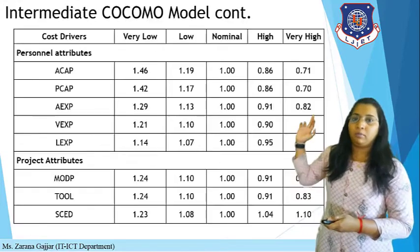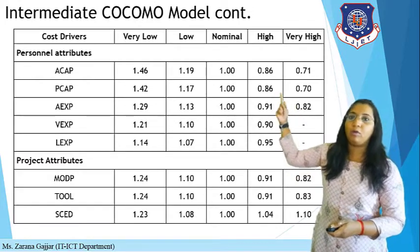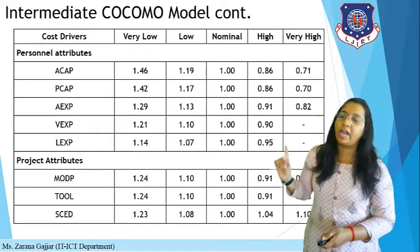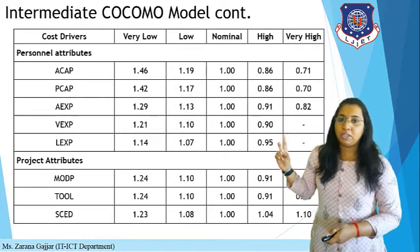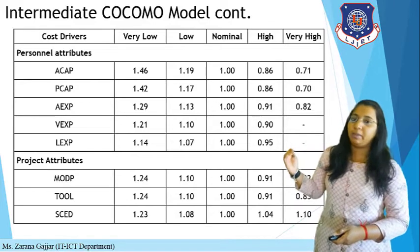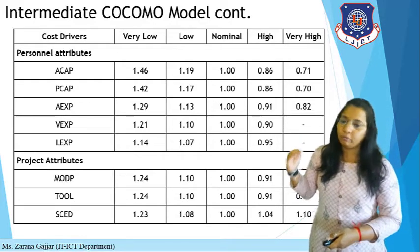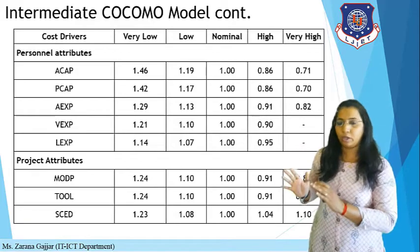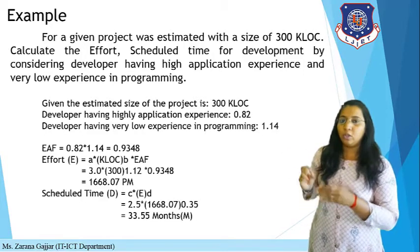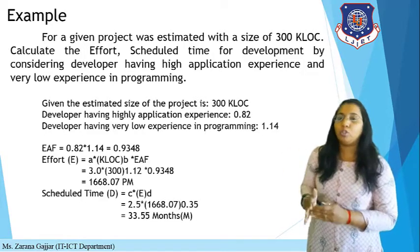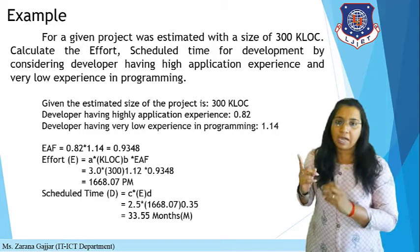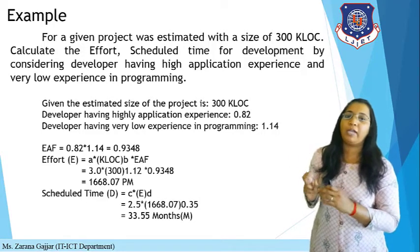The multiplication of 0.82 and 1.14 gives the EAF value. If there are multiple parameters, you multiply each one together to get a single EAF. In this case, the EAF is 0.93.